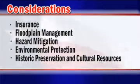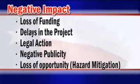Think you're ready to formulate a project worksheet? Before you begin, take a moment to review the following special considerations. Special considerations are issues other than program eligibility that could affect the scope of work and funding of a project. These include insurance, floodplain management, hazard mitigation, environmental protection, and historic preservation and cultural resources. If not thoroughly evaluated, any of these considerations could lead to adverse circumstances. The applicant may experience a loss of funding, delays in project, legal action, negative publicity, or the loss of opportunity,